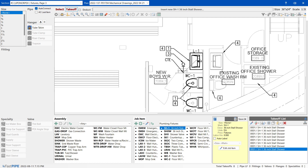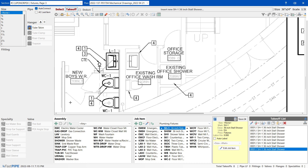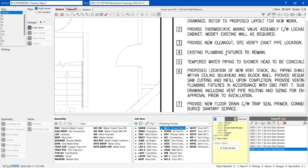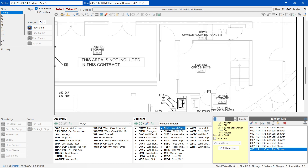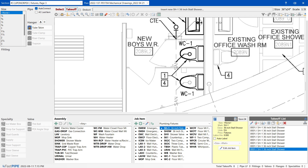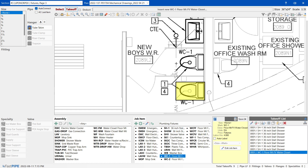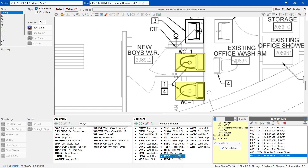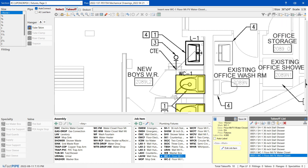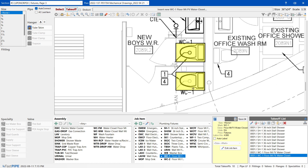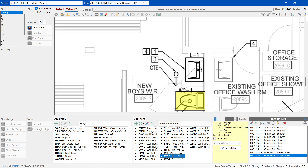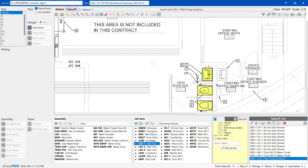When it's light it's existing, when it's dark it's new. Existing says for here - I'm going to read it: 'existing plumbing fixtures to remain.' That's actually a change order - we'll talk about change orders later. I'm assuming there was a mistake here - they shouldn't have put this - it's something we have to let the consultant know about to verify. But that's out of the scope of this video. So we confirm: WC1, WC1, WC1, L1, L1. That's how we finish this existing washroom.